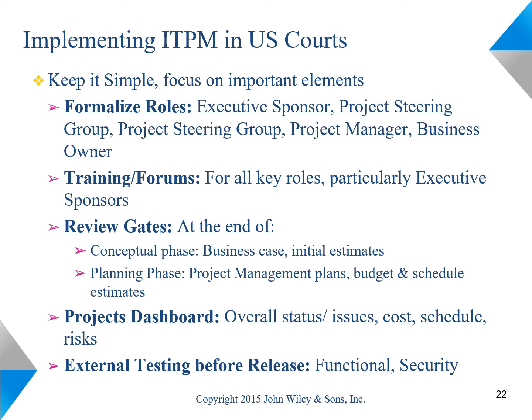We established two gates for funding projects. The first gate was at the end of the conceptual phase and would provide enough funding to complete the planning phase of the project. The second gate was at the end of the planning efforts and was for full funding of the project. The documentation was reviewed and commented on by the staff from the project management office, which was part of my organization.